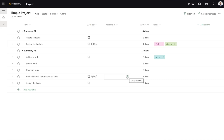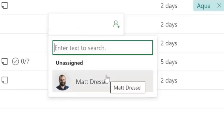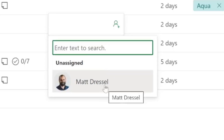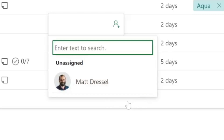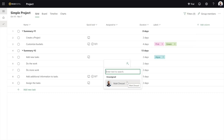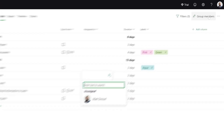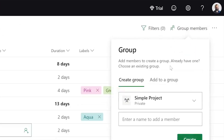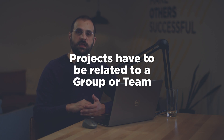We've gone through a couple different ways to view data. Now let's talk about actually using this for a project. One of the first things you're going to want to do is assign these tasks to someone. If I come back to the grid view, I can click on Assign To and assign it to a person. But right now the only person I can assign it to is Matt Dressel — that's not everybody I want. In order to add other people outside of yourself to your project, you're going to have to click on the Group Members option. Projects must be related to a group or team in order for you to share it with other people — this is also how you'll give them access to update those tasks.